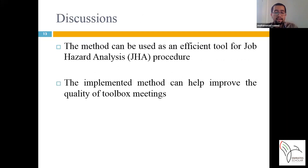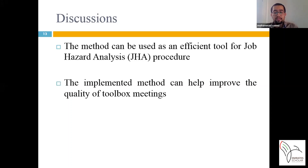The method can be used as an efficient tool for job hazard analysis (JHA) procedures. JHA is usually implemented before performing each activity to identify the risks and hazards that threaten its implementation. Using this method in the JHA procedure, risk factors can be quickly identified at the project planning phase. Additionally, toolbox meetings are among the effective methods used to communicate safety challenges on the construction site, and the implemented method can improve the quality of these meetings.